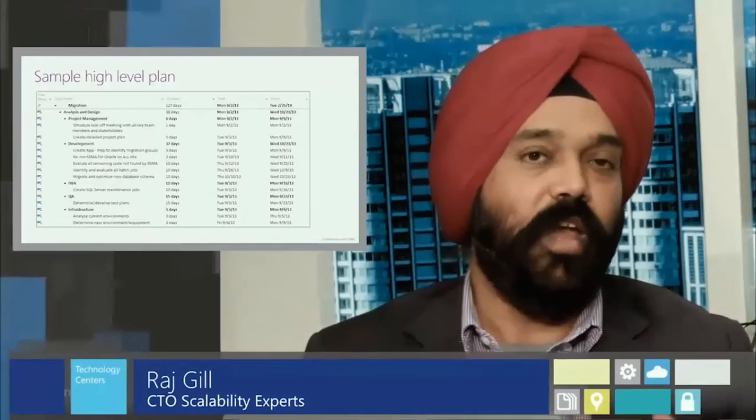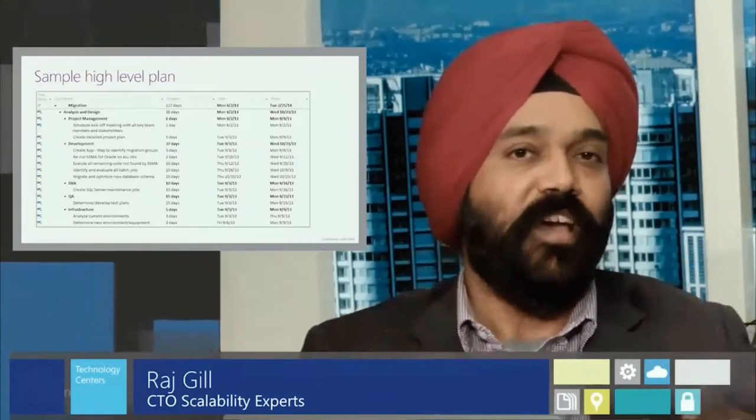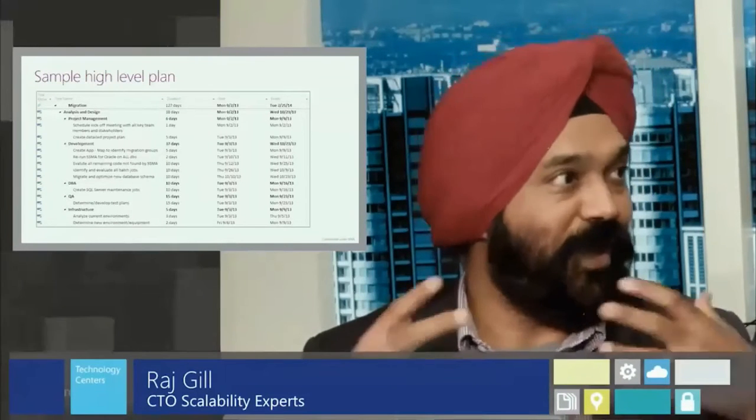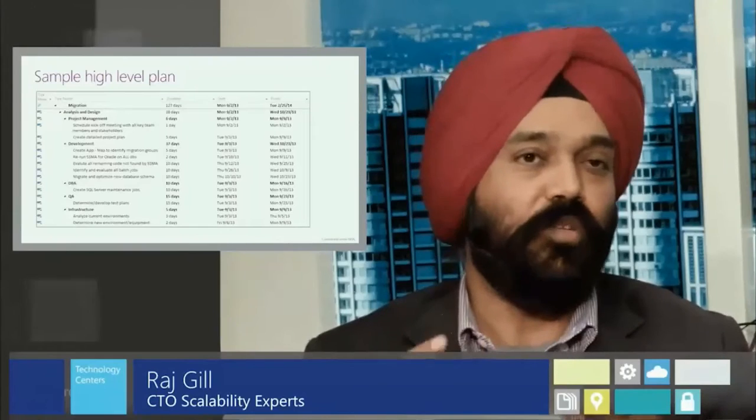So it's very important that you let them know in advance how much time over the next few months you're going to need from them in order to support the migration process. The project plan helps define that, gives them more specificity, and also allows them to plan their time to support the migration. And this is the remaining part of the project plan.